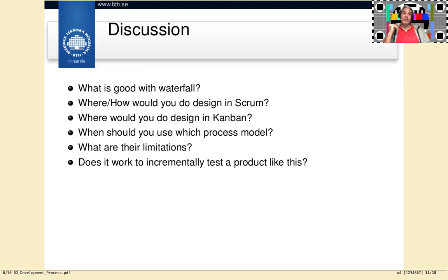So what many companies do when they develop with Scrum is that they have one or two, usually not more than that, but one or two sprints in the beginning which are longer. That enables them to do some sort of upfront design, just enough to get them by, so that they have this overall scaffolding for most of the system in place. So a slightly bigger understanding, slightly more overview, and then they can focus on the actual details for each sprint from there on.